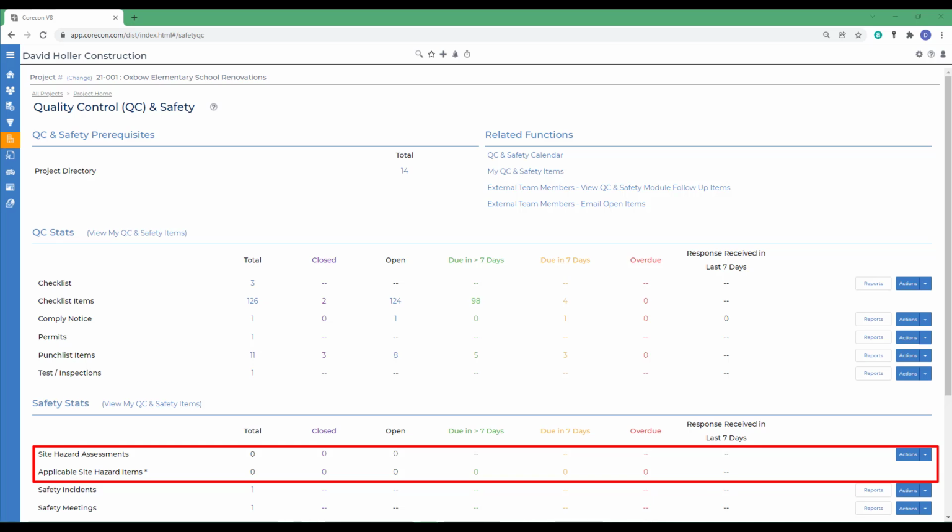Site hazard assessments usually include gathering information about workplace hazards, inspecting the site or workplace for safety hazards, identifying any health hazards, and conducting incident investigations when a hazard does occur. For that reason, a site hazard assessment is something that construction contractors, architects, and engineers will continually refer back to and update throughout a project.